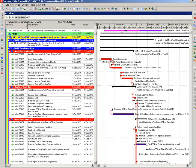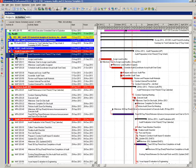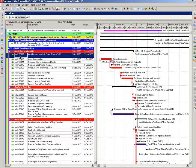To show at a glance which of those four main sections that an activity belongs, we're going to throw in some intelligence on the activity IDs. So, MAP stands for Michigan, our client company here, AP audit prep, dash 203. Now, the 203 corresponds to the audit number.